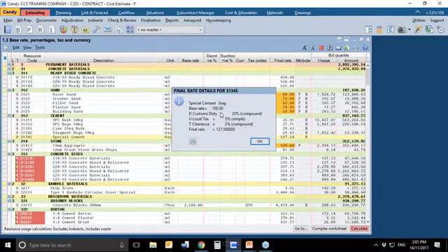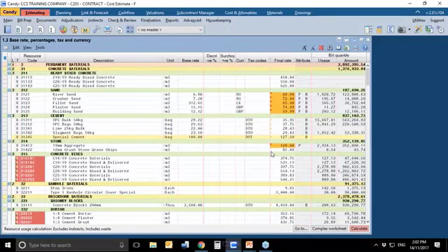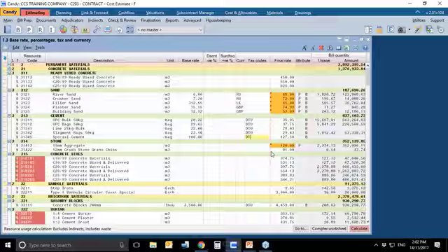Why? Now you've got your customs duty on 100, this is 120, the 5% applies on 100, and this 2% applies on the rate calculated so far. That's why it's 125. So make sure that you keep an eye on the sequence of the tax codes.